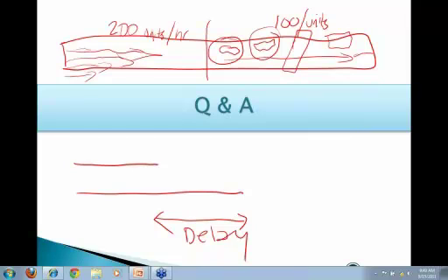There is a webinar that we did a few months back, 2 or 3 months back, called Managing a Contractor Schedule, and I'm sure we'll be having that again coming up soon. But in that, I give you some pointers to help deal with that. And one of the best ways you can do that, James, is at the very beginning of the job. You can put this in the specs: from the notice to proceed or from the notice of award, and we have our pre-construction conference, every week we're going to have a scheduling meeting, and we're going to sit in and see how you're doing on your schedule.